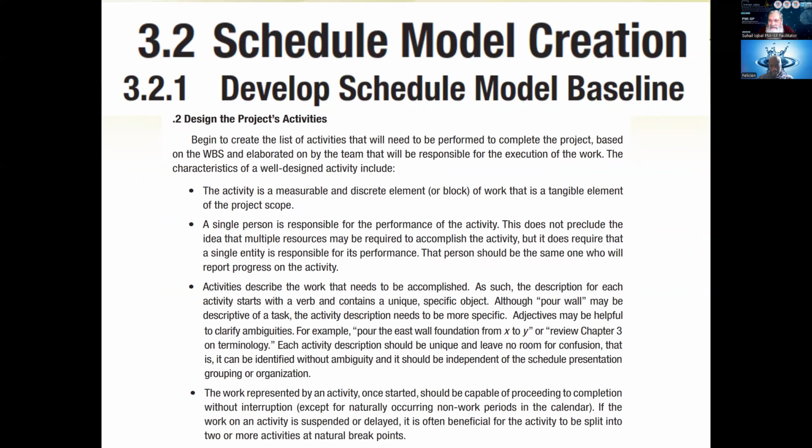But still, you understand it is not humanly possible to capture everything. Sometimes we leave out certain activities, and later on, when we compare it with our work packages and WBS, we find out that these activities which I have broken down out of a work package are not completely representing that work package, and maybe another activity has to be added. So it is possible that the initial list of activities you come up with is not sufficient and it might have to be amended. But basically, we will create a list of candidate activities to start with.